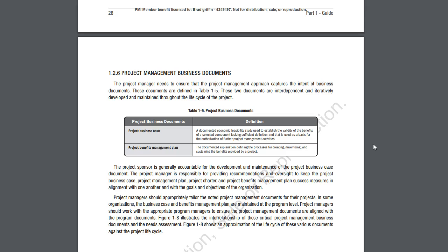And so as we go further in, one of the things you may have is things like a project business case. A business case says there's a business need, so sometimes we call those feasibility studies, or there's a lot of other different terminology. What you're trying to say is my project adds business value, and this is why. This project will cost $1 million, but it's going to return $17 million in economic benefit to the company. My business case is a new law has passed and we have to implement this change in our corporation. So in other words, you're making that case for yours.